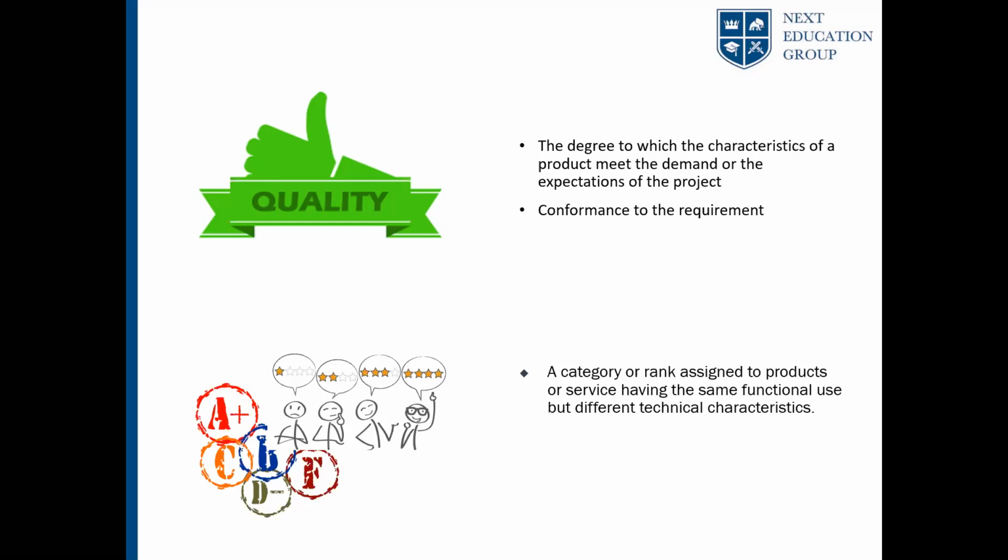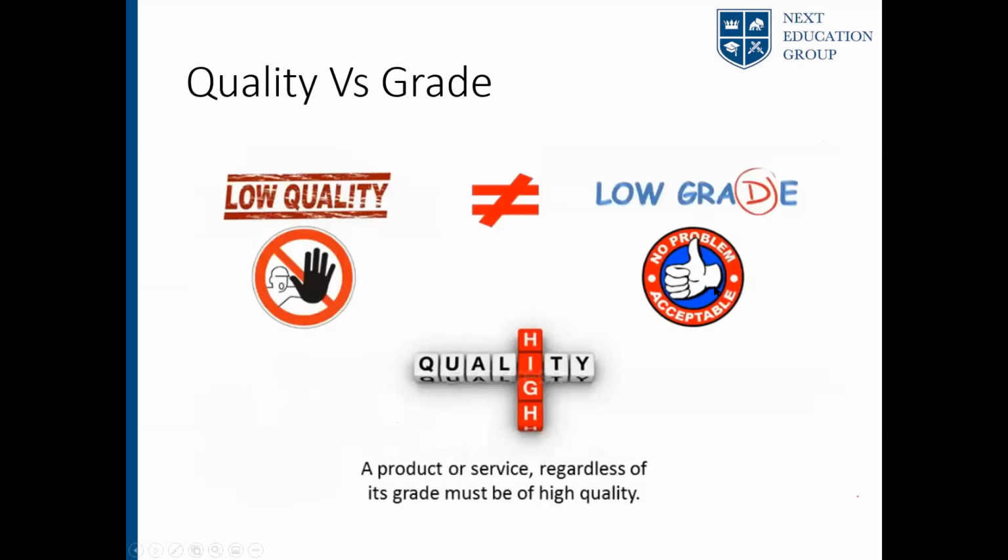Exactly. Anyone thinking differently, thinking that low grade cannot have high quality? Does anyone here think that low grade can't have high quality, or that low grade is not acceptable? So no, as Yanushka rightly said, low grade can have high quality, right? And as Naif said, yes, sometimes based on the situation, you might opt for a low grade product, right? So grade and quality are two different things. Low grade is still very much acceptable, not a problem, but low quality is not acceptable.